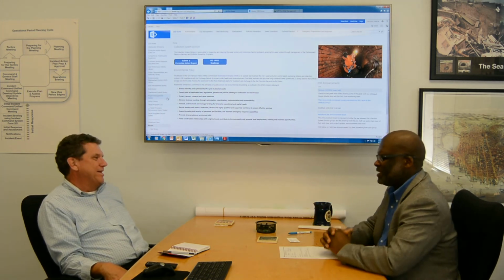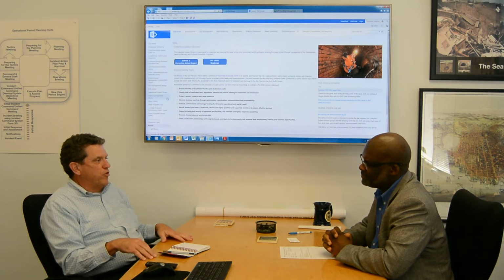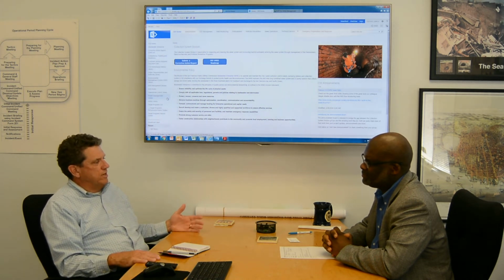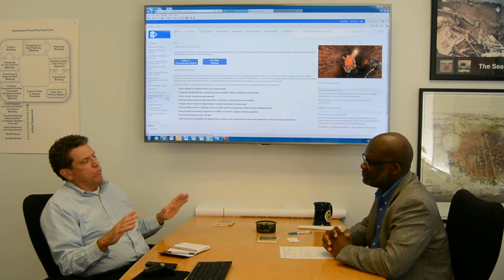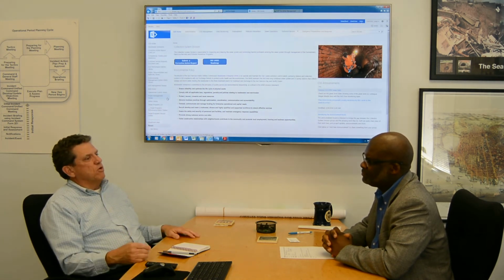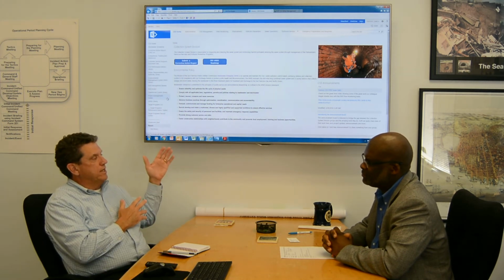So are there any suggestions you have for anyone who might be interested in using this tool? Well, the key to our success in using this was that we did involve people from every level of the organization for their input as to how this should unfold. If you don't do that, you get a twofold problem. One, it's learning the software itself, but then learning the system you're trying to standardize on, like what's our system of classification. Using a stakeholder process for the system of classification, everybody's on the same page about where they're trying to go, and now they just need to learn how to get the application to match that.